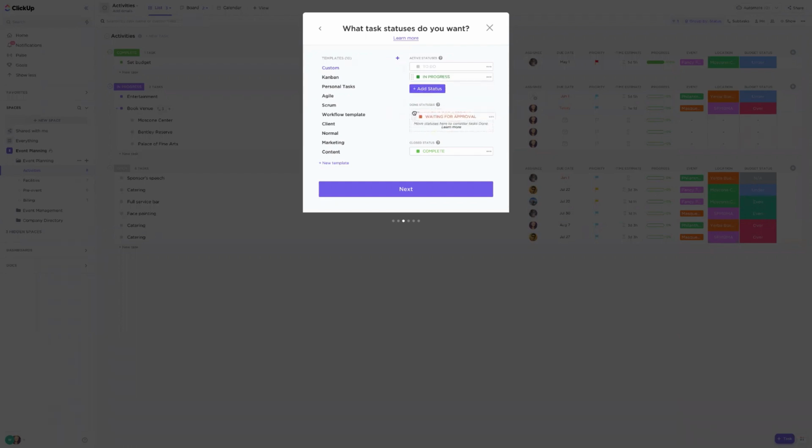So if I put a task in a done status, that will make sure that it is not counted as overdue for me, but it's not actually ready to be closed out because there's still one last step that needs to be concluded before it can be closed.